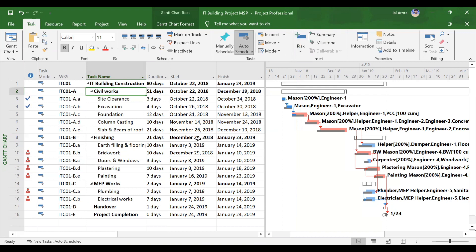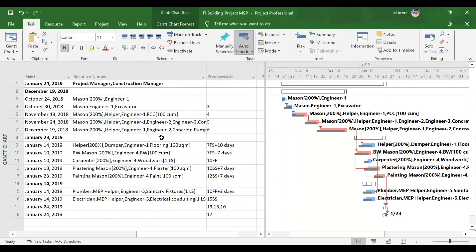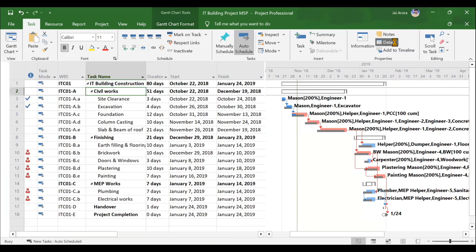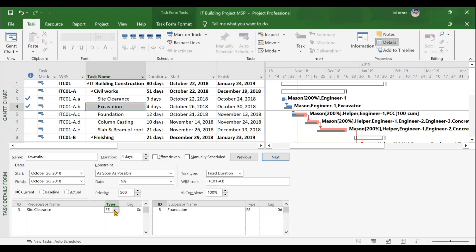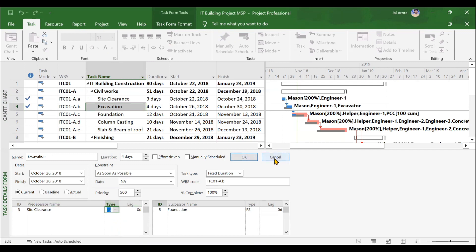After we are done with the video on creation of activities, milestones and all, you will be assigning the relationships. Every activity is related to some other activity in a certain way. For example, foundation can only start after you are done with excavation, and column casting can only start after you are done with the foundation. This is nothing but a relationship — certain activities will have predecessors and successors. This is called a Gantt chart, which represents the complete project in terms of bars. These arrows will only be visible once you assign the predecessors and successors to your activities.